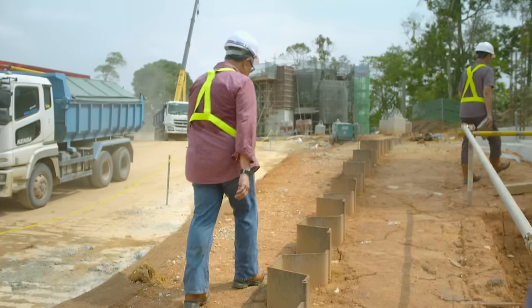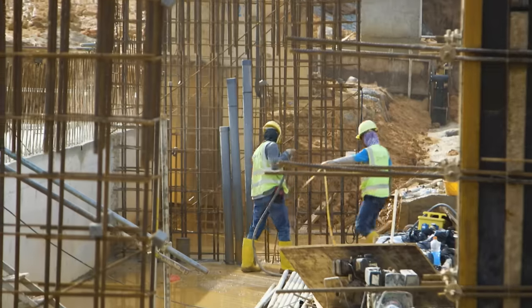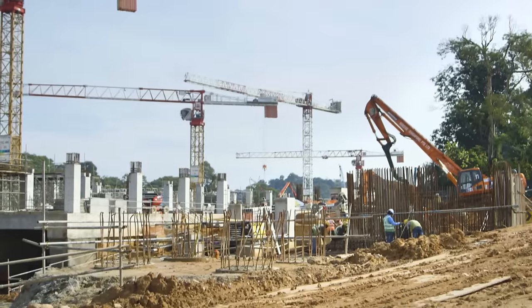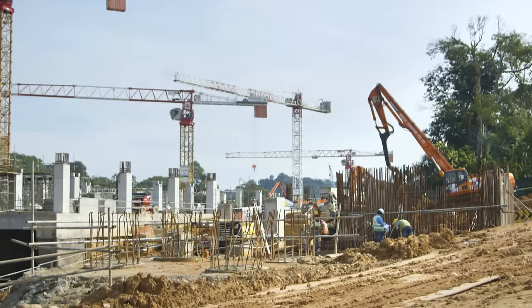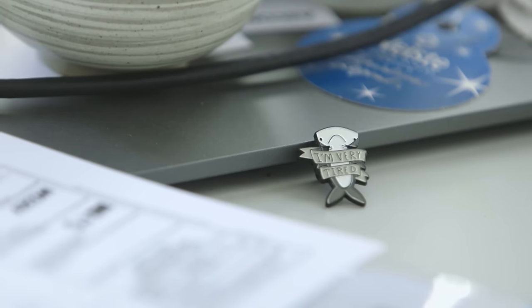I think the columns were planned to be installed 6 days from now. Today is the 10th of July. All of us had in fact been gearing up for that day. But I think we underestimated the complexity of the substructural works that needed to be done before the columns can arrive, so we have kind of run out of time for that. It is very stressful.